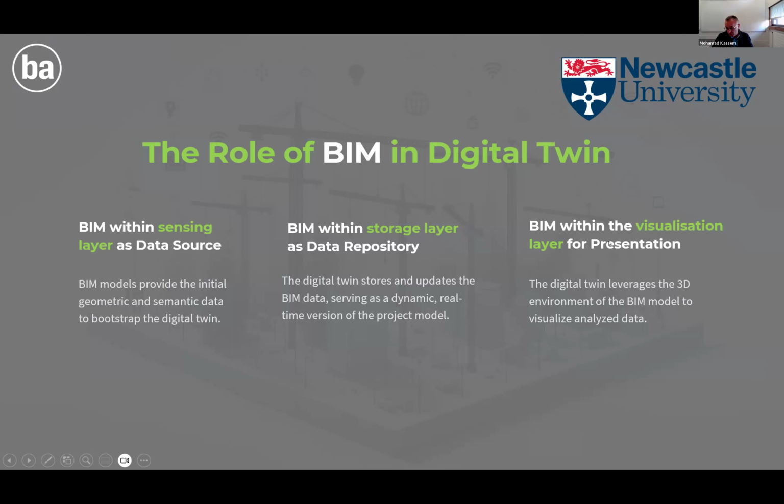So what we do is, within the 4D model, we can mark up or indicate the hazard zone for risky intrusion. That markup within the 4D model is synced with the IoT. The IoT consists of a geofencing IoT, so it will reflect those data from the 4D model and perform geofencing on the construction site.